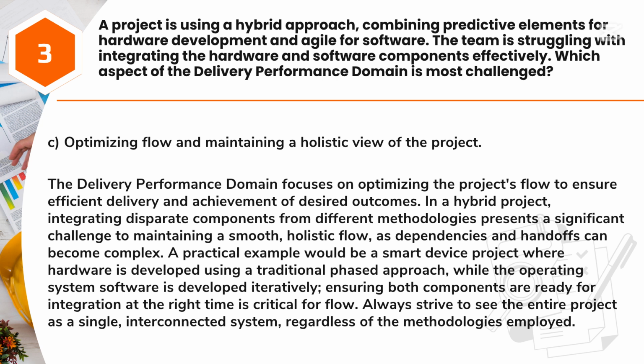A practical example would be a smart device project where hardware is developed using a traditional phased approach, while the operating system software is developed iteratively. Ensuring both components are ready for integration at the right time is critical for flow. Always strive to see the entire project as a single, interconnected system, regardless of the methodologies employed.